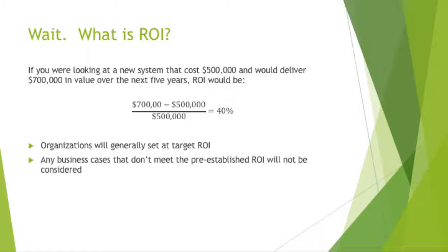Let's take a look at an ROI example. If you were investigating a new system that cost $500,000, but which would deliver $700,000 in value over the next 5 years, the ROI would be $700,000 minus $500,000 divided by $500,000 for an ROI of 40%. Organizations generally set a target for ROI, and any business cases which don't meet the pre-established ROI goal will not